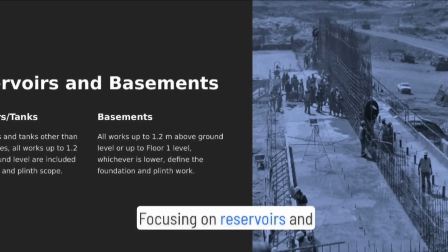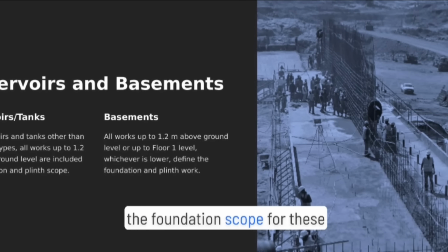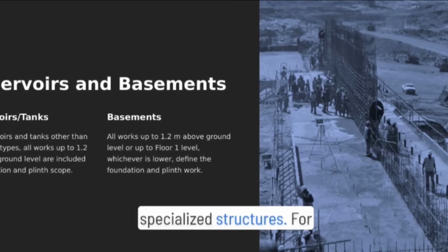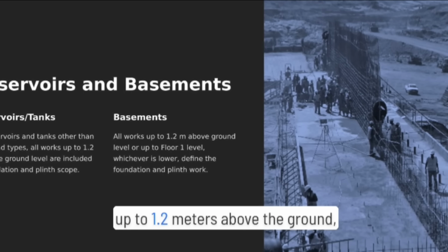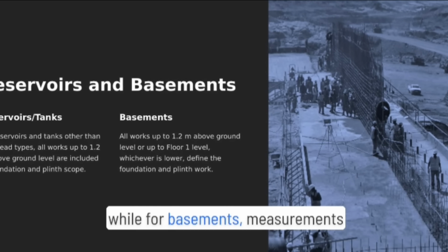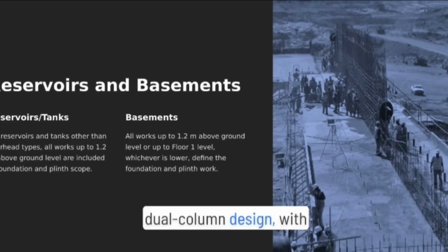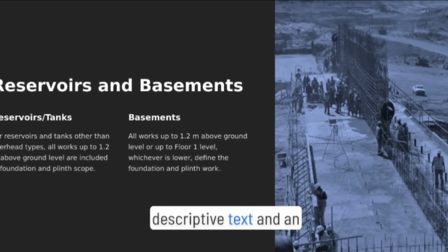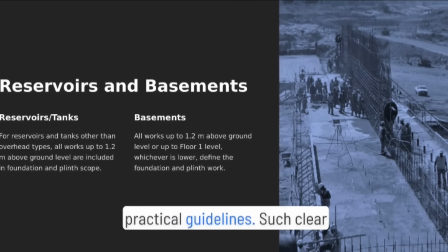Focusing on reservoirs and basements, this slide explains the foundation scope for these specialized structures. For reservoirs, works are carried out up to 1.2 meters above the ground, while for basements, measurements extend to floor 1 level. The dual column design with descriptive text and an illustrative image reinforces practical guidelines.